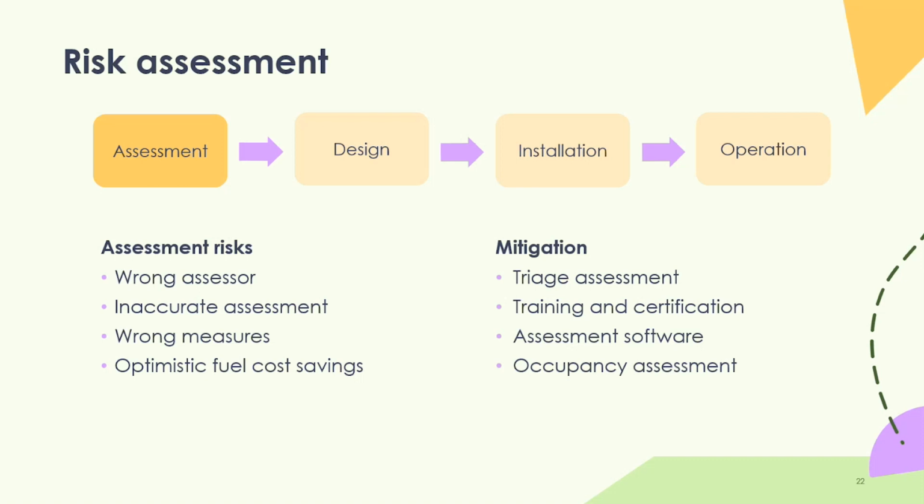I would recommend, when you're putting forward your applications for SHDF, validating some of that desktop data with some real live retrofit assessments or detailed assessments, so you can be confident that when you go to visit the properties and start delivering, the measures you put forward for them are going to be reliable.